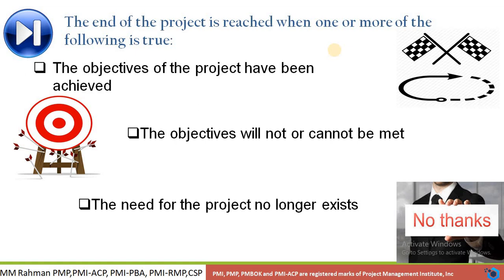When the objectives of the project have been achieved, the project is finished. Also, when the objectives will not or cannot be met — sometimes we realize we are unable to meet the objectives — that time we also say the project is finished. If the purpose of the project can no longer be fulfilled and we are not going to invest anymore, we close that project.